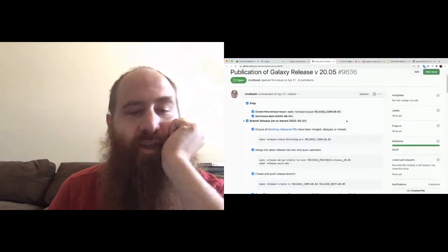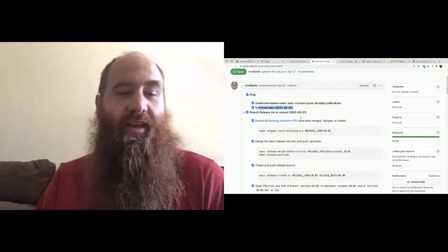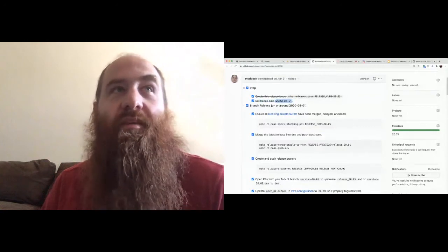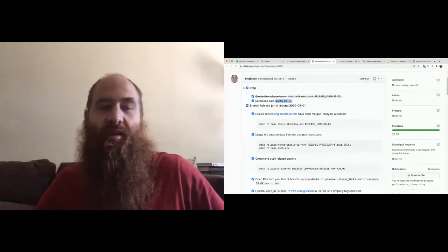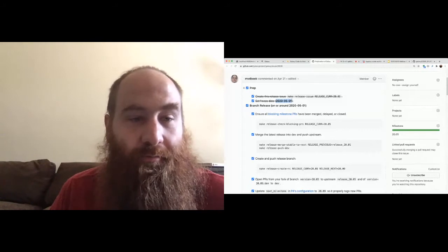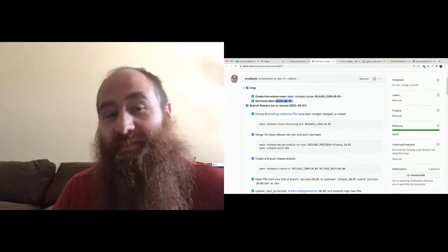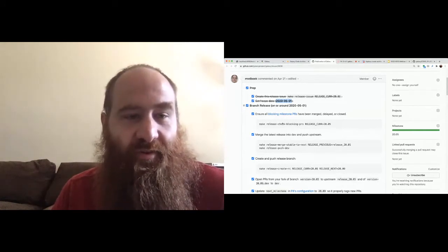So we pick a freeze date. The freeze date is the beginning of the month that we do the release, but sometimes we'll try to push it ahead of time because the release process takes a lot longer than a month. So probably we froze before May, and we didn't get the release out until June. But there's a checklist for that.